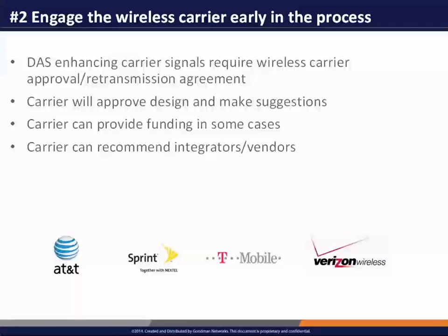The carrier can also help you understand what's going on in the outdoor space. So you may be looking at your assessment and you may have problems, say in a dorm or dorms on the perimeter of your campus. And you may hire someone to design a system, perhaps even begin installation of that system that serves those dorms, only to find out that a particular carrier has plans to build a cell site in the macro environment just a block or two away from the dorm that would solve all of the in-building problems, or most of the in-building problems that you're having in that dormitory, using the dorms as an example.